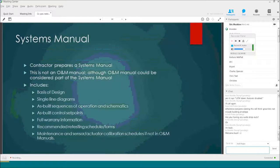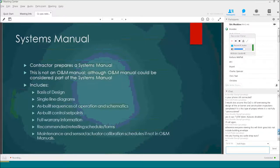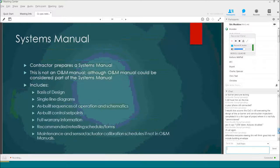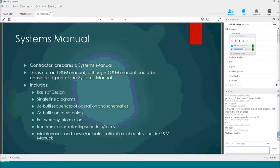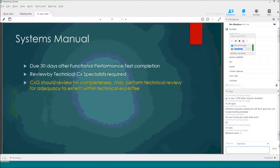The contractor has to prepare a systems manual. It's not an O&M manual — operation and maintenance manuals could be part of it, but what this includes is a basis of design narrative of how the systems should work, single-line diagrams showing how systems are laid out, as-built sequences of operations, control set points, full warranty information, recommended retesting scheduling forms, and a schedule for sensor and actuator calibration. It's due 30 days after functional performance tests are completed — meaning after all issues discovered during functional performance testing have been corrected and retested. The government specialist should review it for completion. In the Army, we're required by Army Sustainability Policy to provide maintenance and service life plans required by ASHRAE 189. The contractor prepares the plan, which is a submittal we get concurrent with the systems manual.